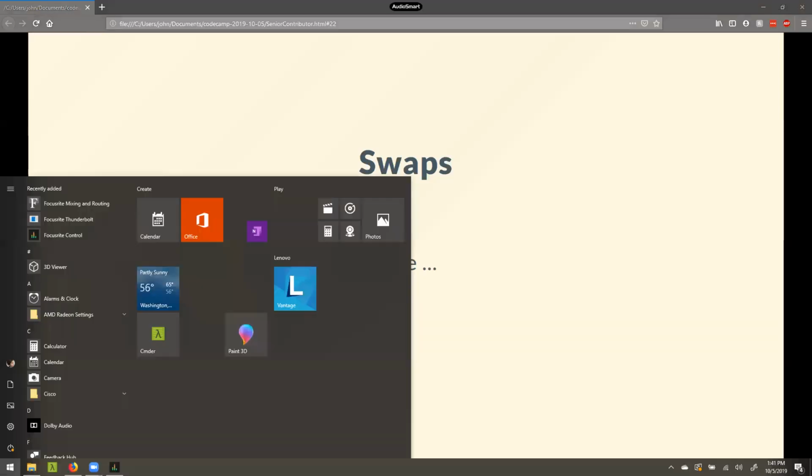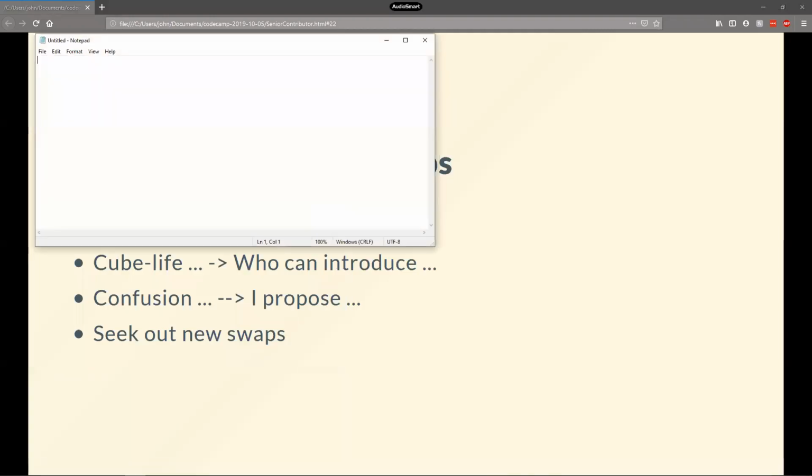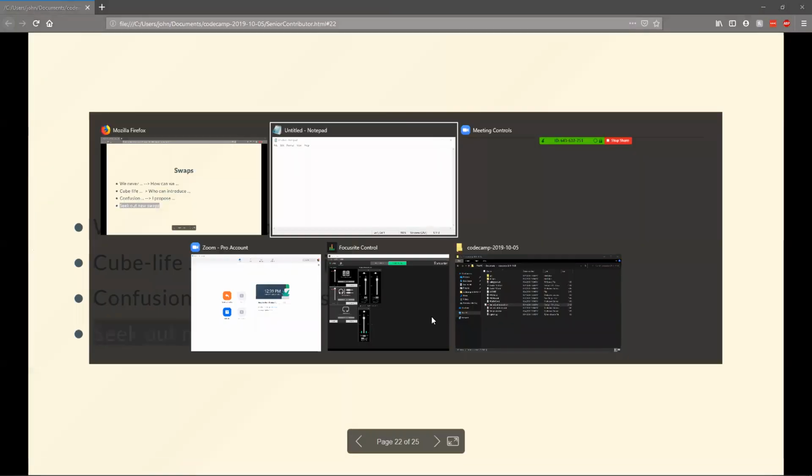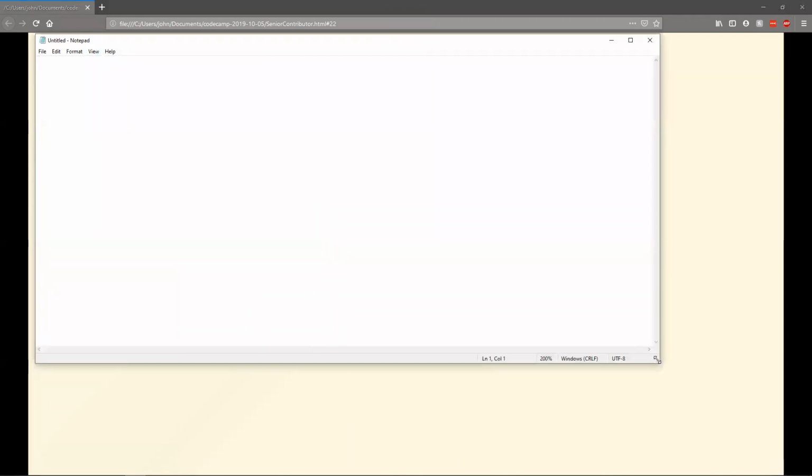That's a good point. We use similar tooling and make it available from the start of the sprint so that people can go in. That way you're doing it as soon as you identify those issues, right? And you're not spending a lot of meeting time whiteboarding out what you're saying. That can all be done ahead of time. Everyone can get a chance, as they have time, to review it before the retrospective. And then that allows you to spend much of that time coming up with action items and solving those problems.